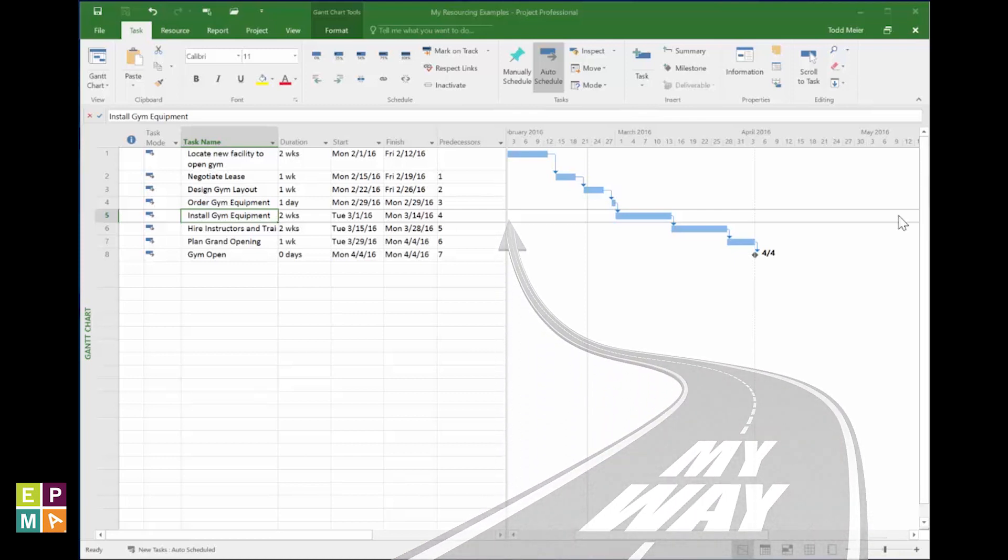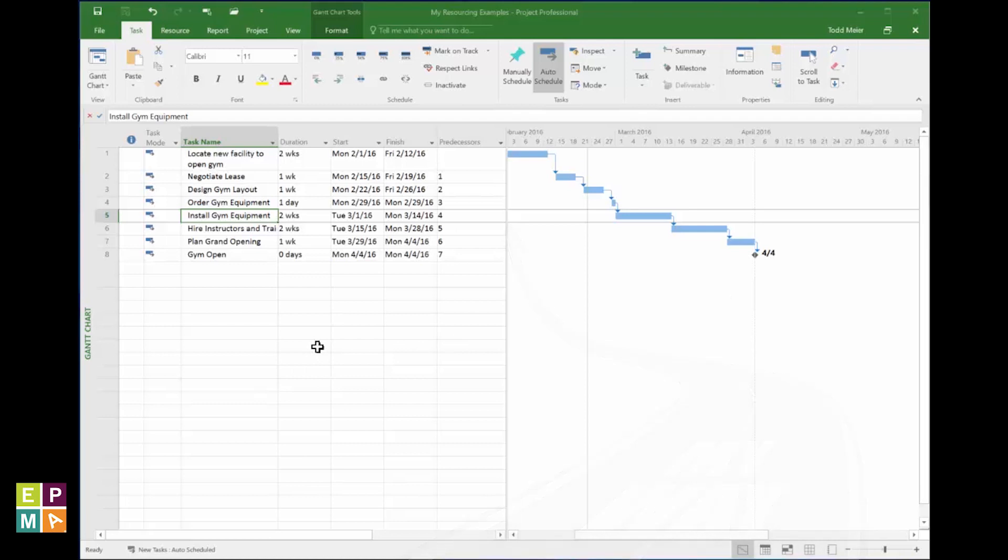You take your schedule, right? And you already added resources to your resources pool. Okay, so they're there for you. Make sure you click the task tab, and then click on your task, the one you want to add your resources to. Don't double click on it. Just click on it once to highlight it. Good.